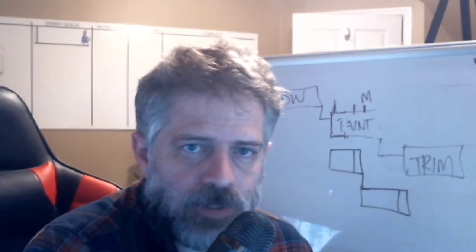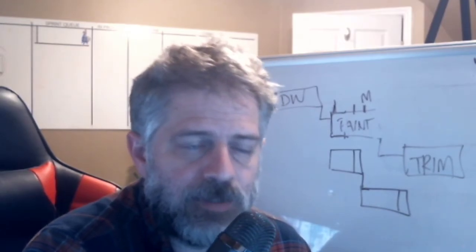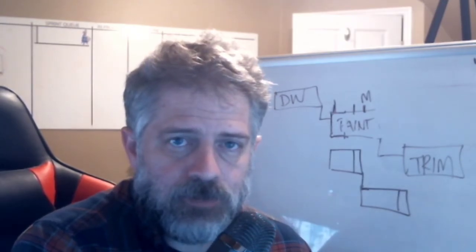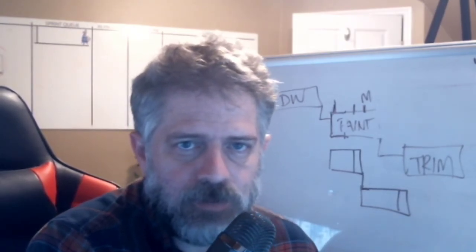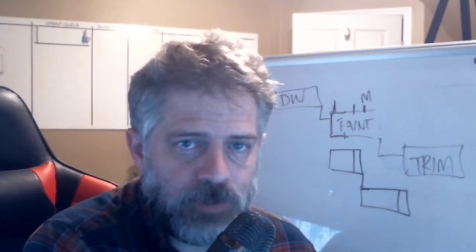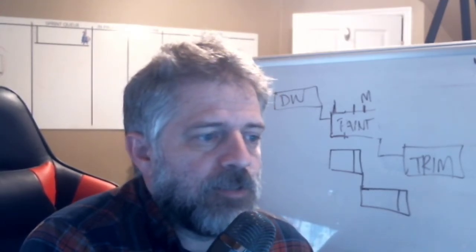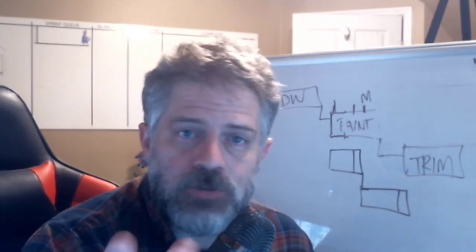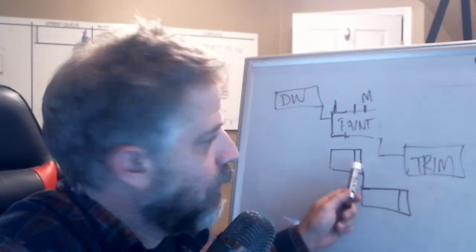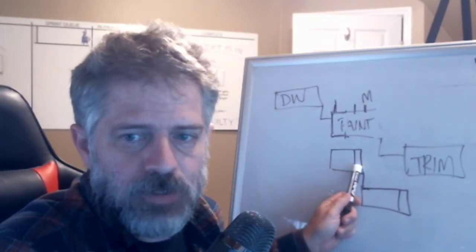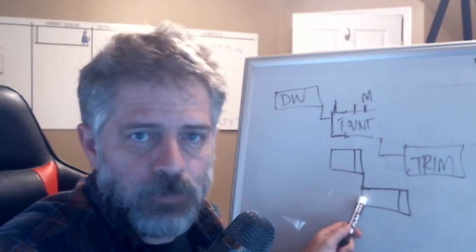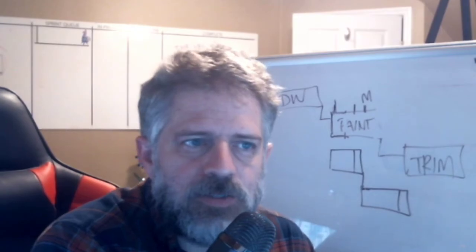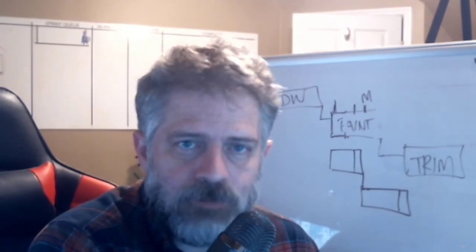I've been talking to you for the last month and a half, and we've agreed on this date, and I want to be flexible, but the flexibility came in 2 weeks ago when we discussed, and you told me, so I've built my whole schedule around it. So let's go ahead and get started. So it just changes the conversation, and both of you are understanding where the margin is in the situation, and I tell them, I'm watching these 2 days of margin. I'm watching it get consumed. And I have my trim carpenter coming in because you told me it would take 6 days, and that included 2 days of margin. So you see, it changes the conversation a little bit when you identify what the margin is